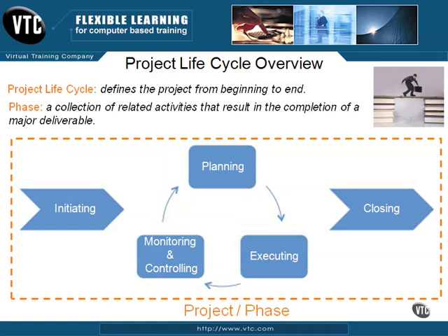I pointed out an example of grouping of project phases a moment ago, which is what you see on your screen. And an important note often missed is that moving from one phase to the next is a formal process, just as is beginning a phase and closing it out. They are not occurrences that take place without acknowledgement or first obtaining approval.